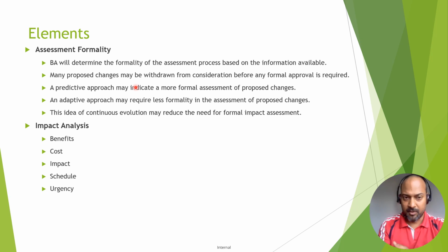If it is a predictive approach, it may need a more formal assessment of the proposed change. Predictive approaches are basically the waterfall model, where at the start itself we want to freeze everything and know about everything so that we don't get unknown surprises later during the development. So we do that more rigorously and in a more formal way. We do a lot of documentation, and we do all the assessment in one go. It is required that everything is readily available in the first go before we kick off the project.